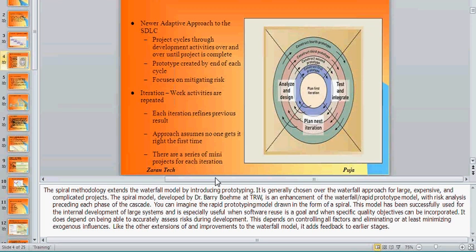But more importantly, let's look at the corporate world, right? There are 4 different business units. Every year, all these different business units will have project goals and objectives that they must meet using IT projects. Yes or no? Now we have one pool of resources, development team, BAs, correct? Even if we had separate BAs, we still have one development team. So the development team can only work on X number of projects at a given time.